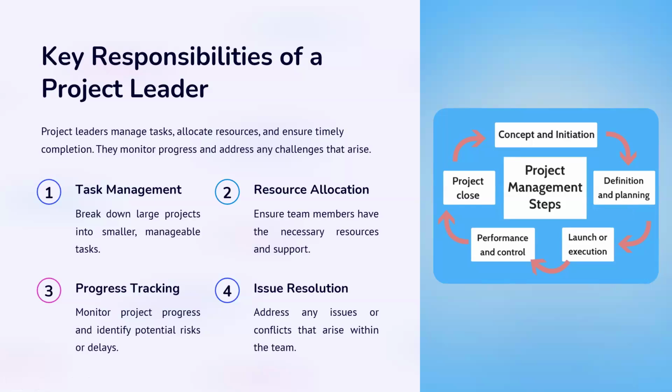And launch and execution. When the project is broken into smaller projects, execution can be done whenever a smaller project gets over. So say it is a 1.5 year, 18 months project, and that project is broken down into small 3 month mini projects. It means the first task has to be done in the first 3 months, and once that is completed successfully, the team goes with the second task, for the next 3 months.